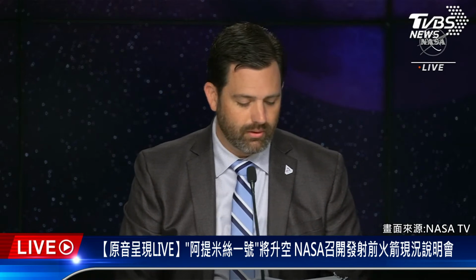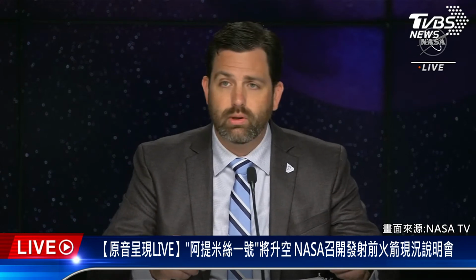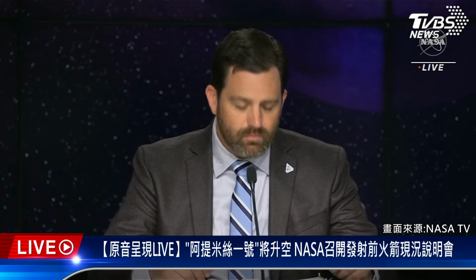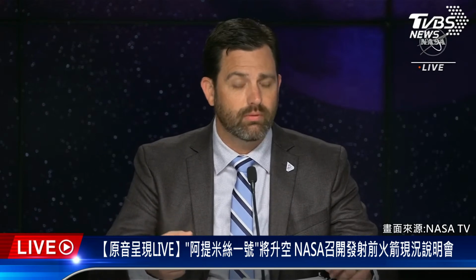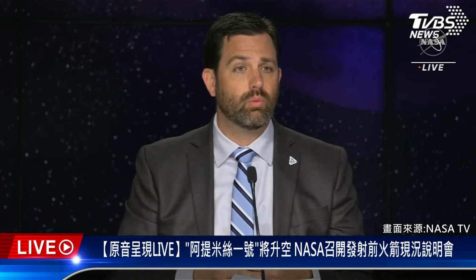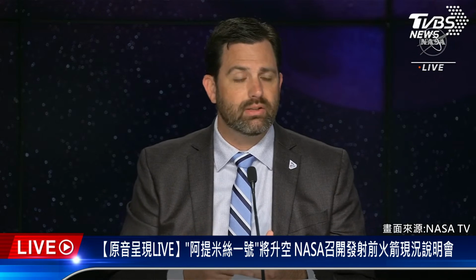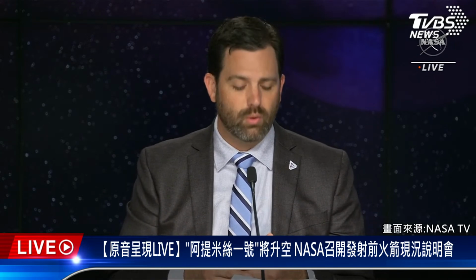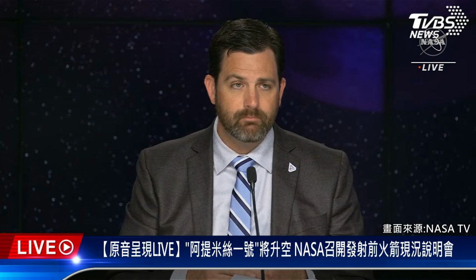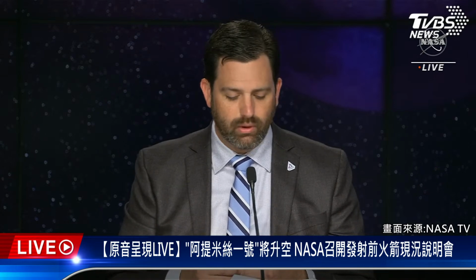When we talk about going into tomorrow and the day of launch, activities pick up really early. So at 2 a.m. we're doing full clearing of the blast danger area. We get into air to GN2 switch over at about 3:30 a.m. And so that allows us to then go into what is called a tanking meeting at 4:45 a.m. And we expect to get a decision coming out of there to where we can begin cryo operations at about 5:30. At 8 a.m., you'll expect to get into the engine bleed kickstart, so that's going to be one of those big milestones that we're going to pay attention to.